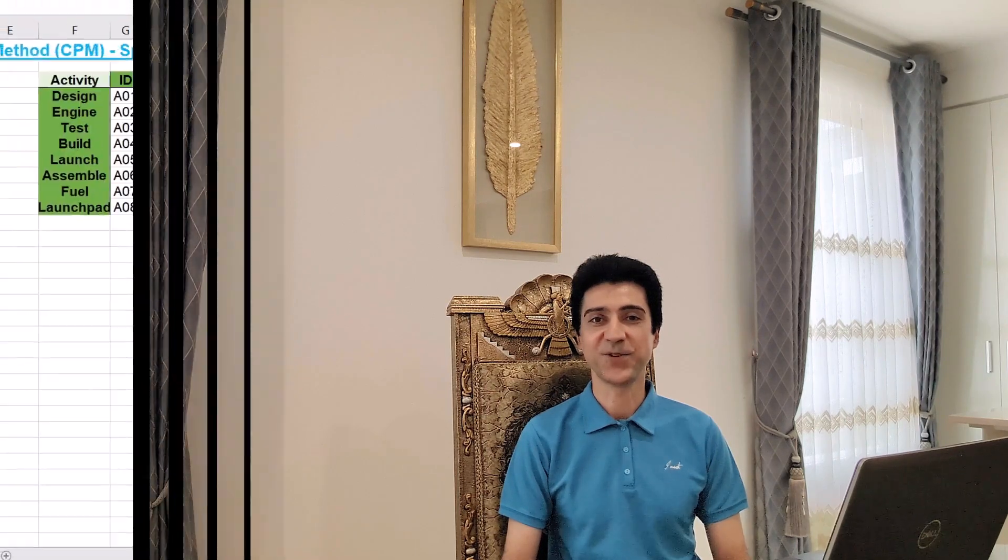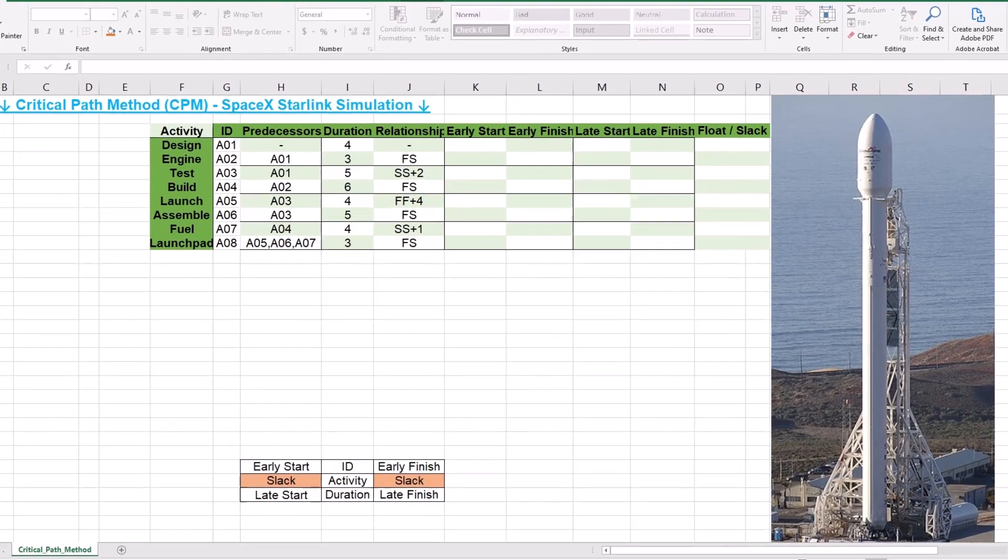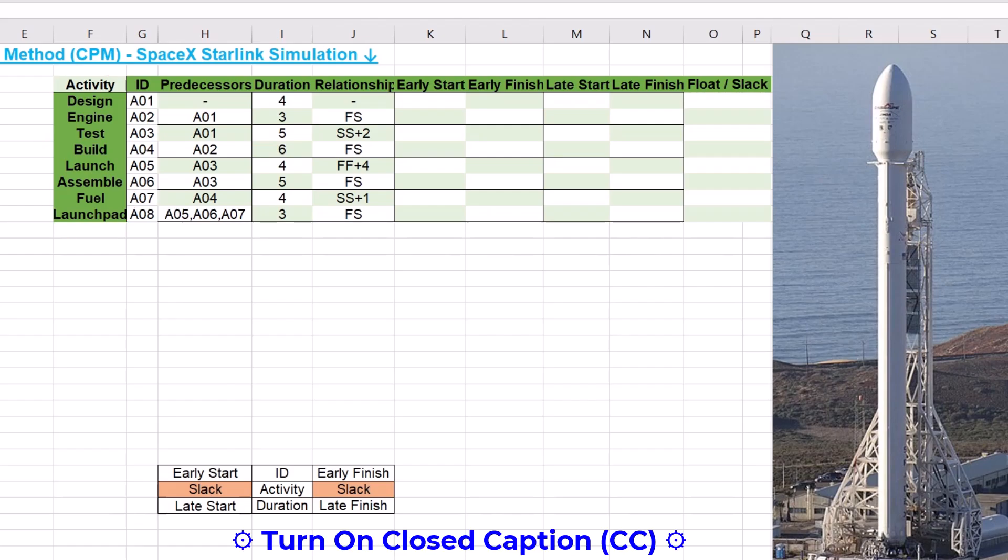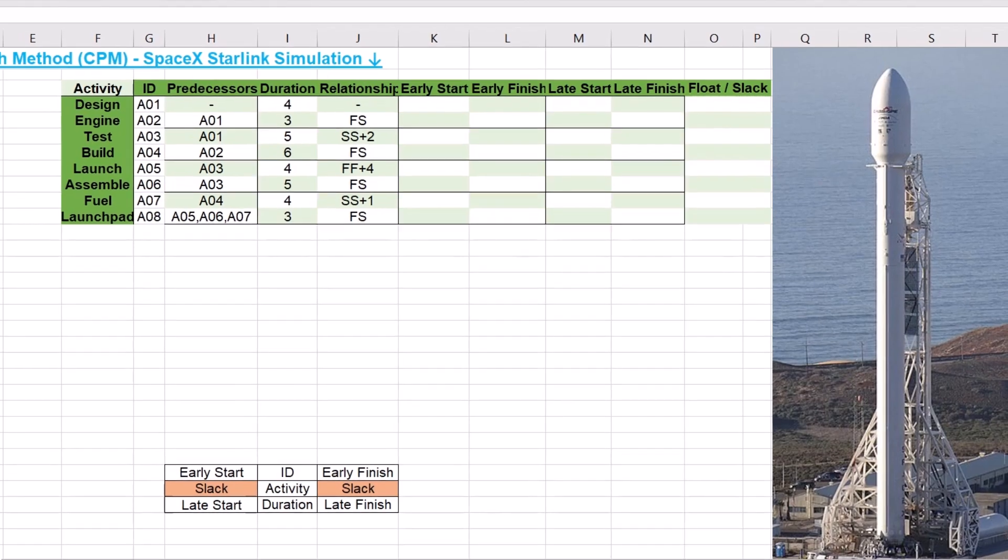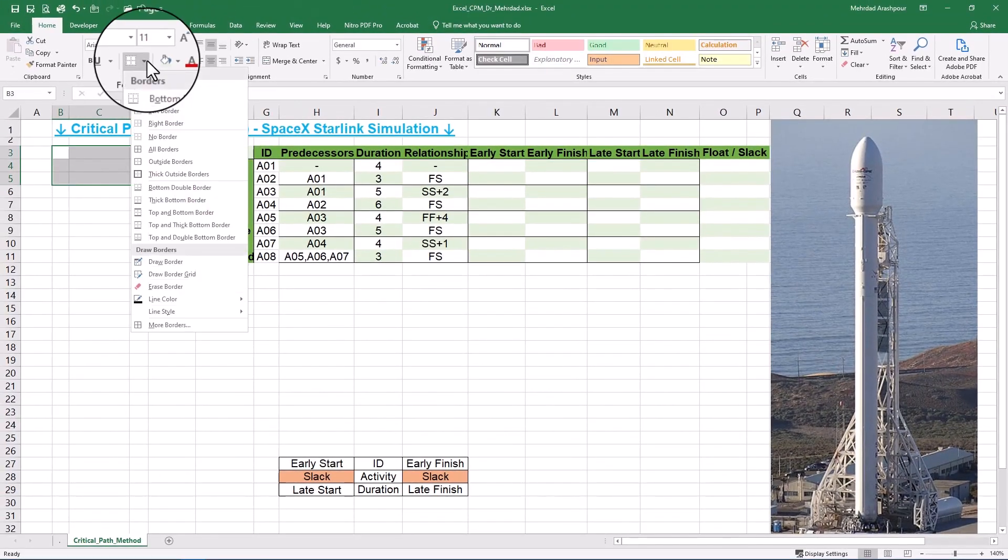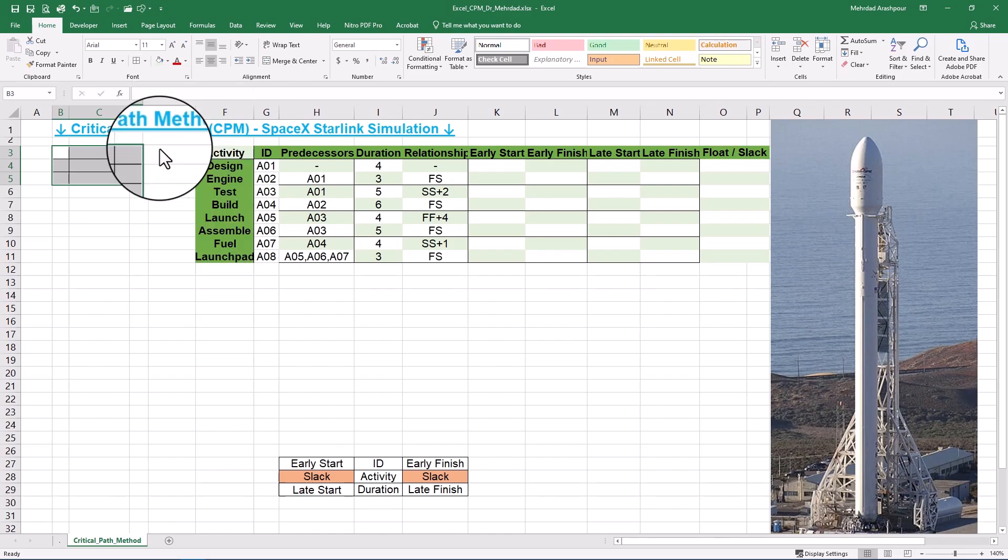Step one is drawing activities of project networks. Our case study simulates an aerospace engineering project similar to SpaceX Starlink. The simulated project has several activities and we want to use critical path method or CPM to identify potential critical activities that delay the entire project. Our first activity is design of the Falcon launch vehicle, for which the first activity block must be created. Select a range of 3x3 cells and draw all borders.